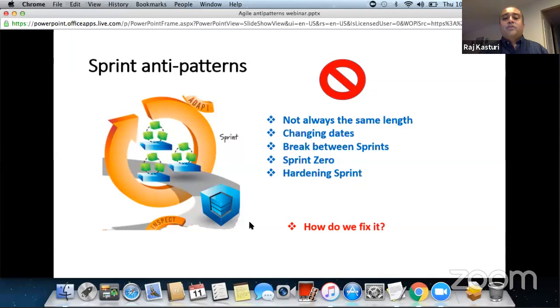So you want to make sure that decision is made based on your past historical information, how much has been accomplished. As long as all the team members can get the work done, it should be between that 3 and 9. And the Scrum Master and the product owner are not included in that count. So that means there could be two other people in there.